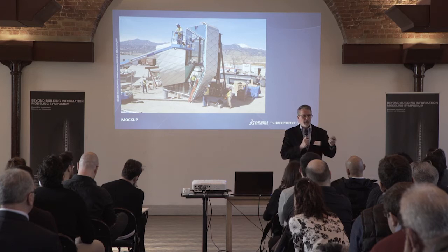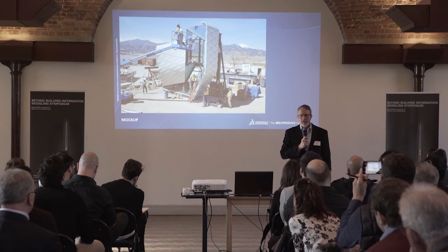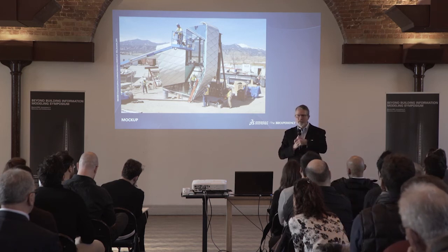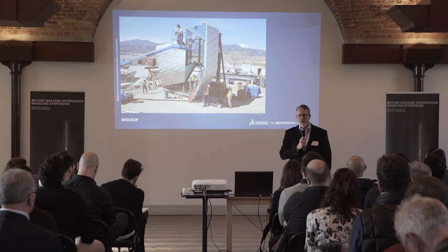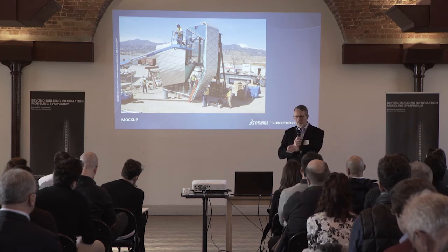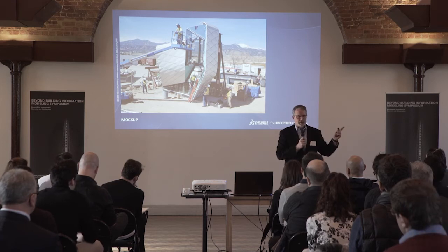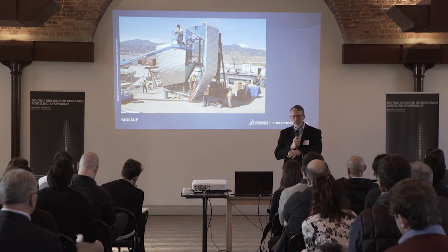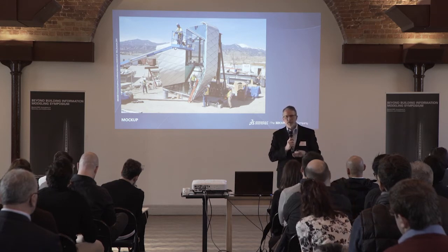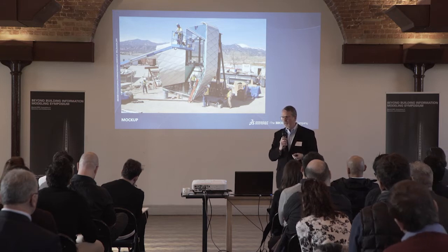Whenever the caulking wasn't right or the installation of a panel wasn't done properly, going through the drawings and the specs and explaining why it's wrong is challenging. But if you can bring the person over to the full-scale mock-up in the field and say, we all agreed on this, how come it looks different on the building? That's your control standard, right?